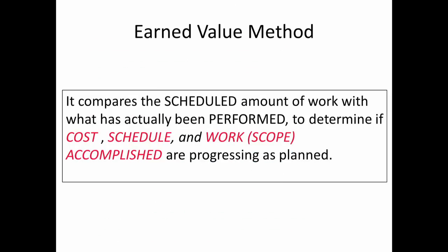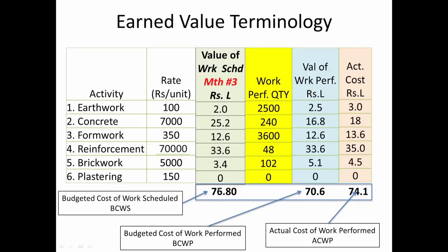Going back to our example: we have reviewed the terminology and can see BCWP, BCWS, and ACWP. We said we should have been at 76.8 but we are only at 70.6 as far as schedule goes — so we are behind schedule. And although we spent 74.1, we only got 70.6 worth of work, so we are over budget.